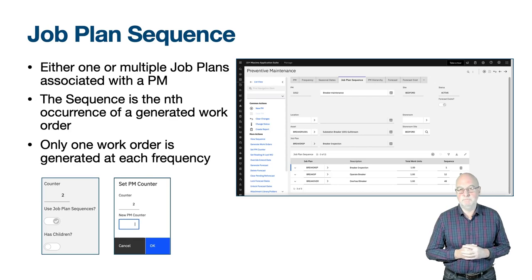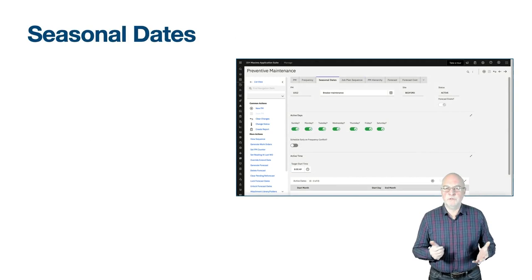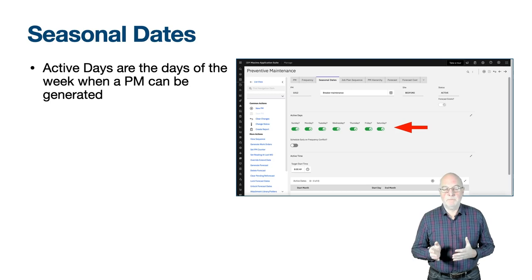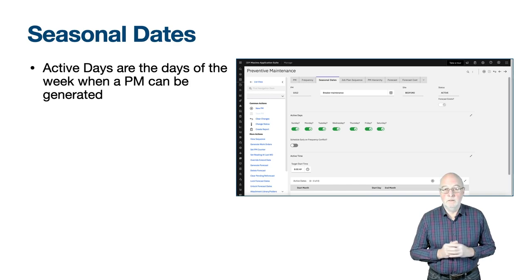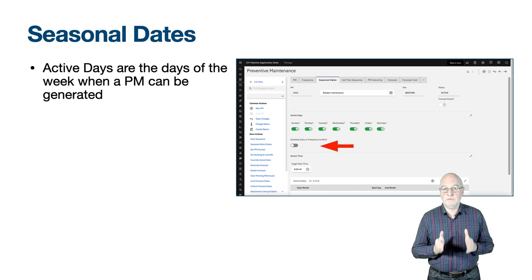Before generating work orders, consider when they can be generated. The seasonal dates tab: the active days are the days of the week on which you are happy for a work order to be generated. For a 24x7 operation any day would be selected. If you normally only work Monday to Friday, deselect Saturday and Sunday. If a work order falls due on a Saturday or Sunday, the target start date will move to the following Monday — unless 'schedule early on frequency conflict' is set, in which case it will be Friday.